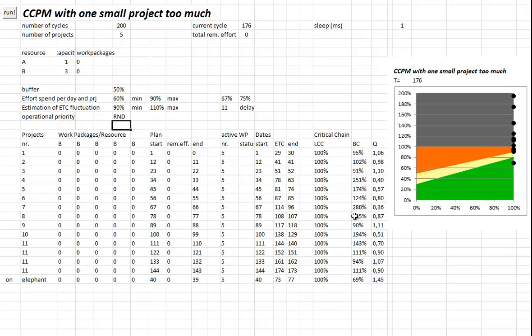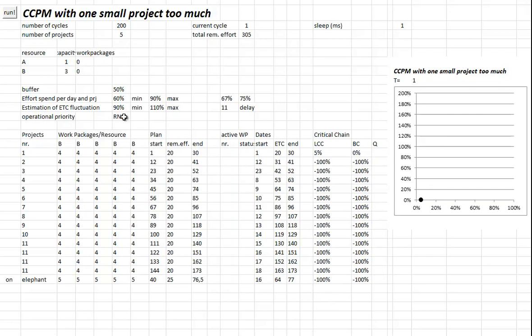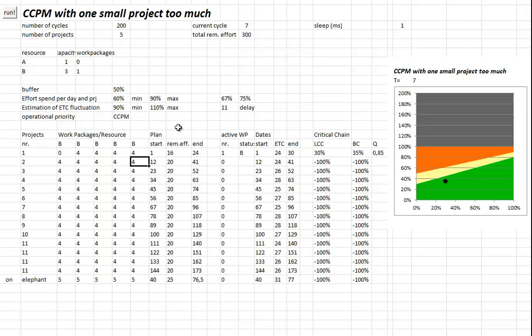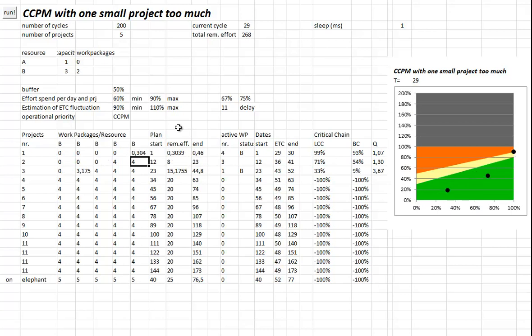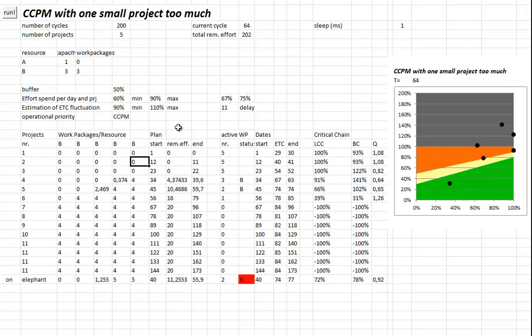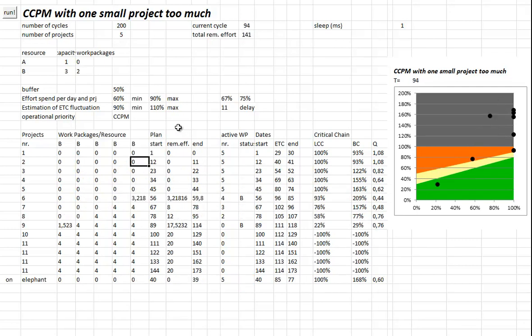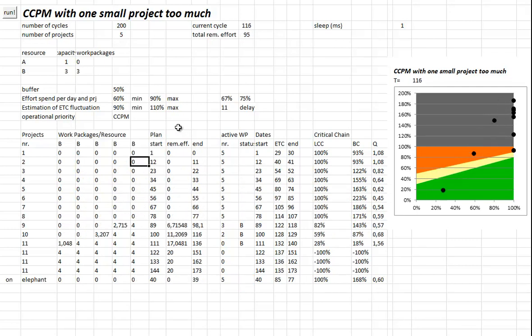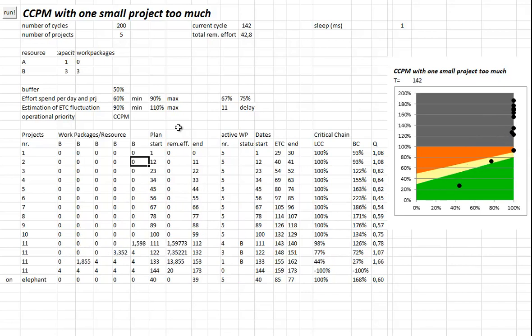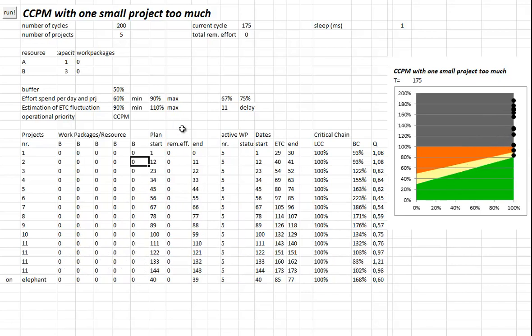If it unfortunately targets the most important project in the company, you're lost. If you choose random priority on operational base, the problem of the elephant just levels out, but a few projects can get in big trouble. The critical chain helps to smooth that, but if you overload your pipeline you really suffer. You can't avoid that. You see the points moving up, but with critical chain scheduling one or two got problems but it's not so hard - it's smoothly distributed. It's a more stable system.